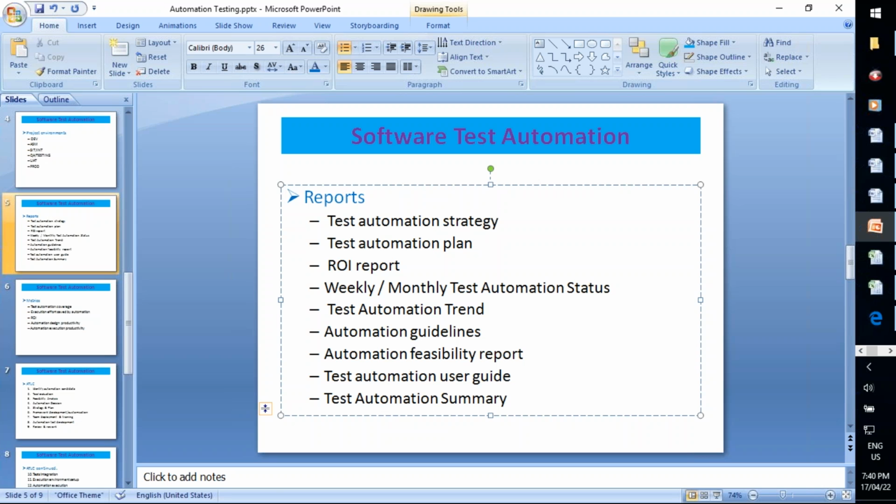And what does the test automation plan document contain? This document contains, at each stage, the details of that end-to-end approach you defined in the strategy. At every stage, what activities or tasks should be completed, when each task should be started, when each task should be completed, who is responsible for that task, what skills that particular resource should have, what deliverables should be delivered to the client at every stage, and what risks you may face at different stages.